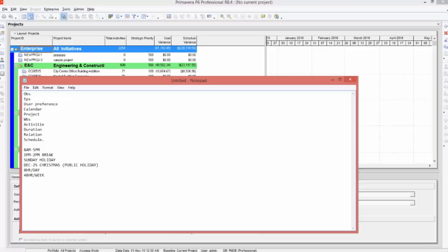And let's consider a month, 30 days will be there. Out of 30 days, 4 Sundays will be there. So we can consider a month as 26 days. So 26 times 8 hours per day makes 208 hours you will be working in a month. And for a year, 1 month is 208 hours, so per year, 208 multiplied by 12 will give you 2496 hours per year, right?